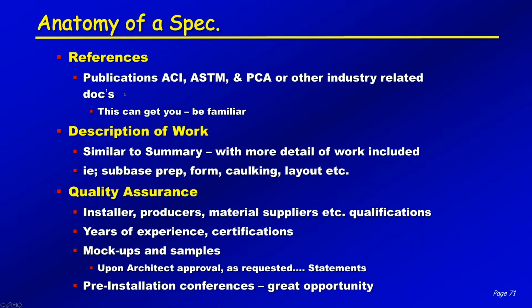Talking about reference material, ACI, ASTMs, PCA, and those kinds of things. So you need to be familiar with all those particular documents. The description of the work, similar to summary, with more detail telling you what's involved. It might tell you that you're responsible for the sub-base prep, some formwork, some caulking, maybe some layout. Here's where quality assurance falls in. This is where you guys probably get a little bit more involved.